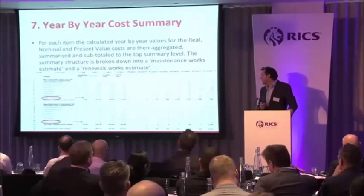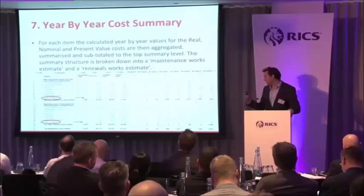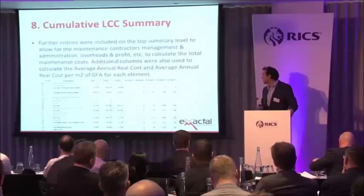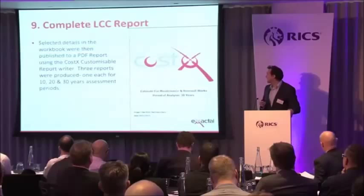Now what we wanted to do is use the NRM3 structure, which is applied to maintenance costs and renewal costs. But these calculations can be done for other operations costs such as energy costs, cleaning costs, post, et cetera — and they would be based on annual costs. The NRM structure also has markups at the bottom, so we've added in contractor's overhead and profit, VAT, tender inflation, et cetera.